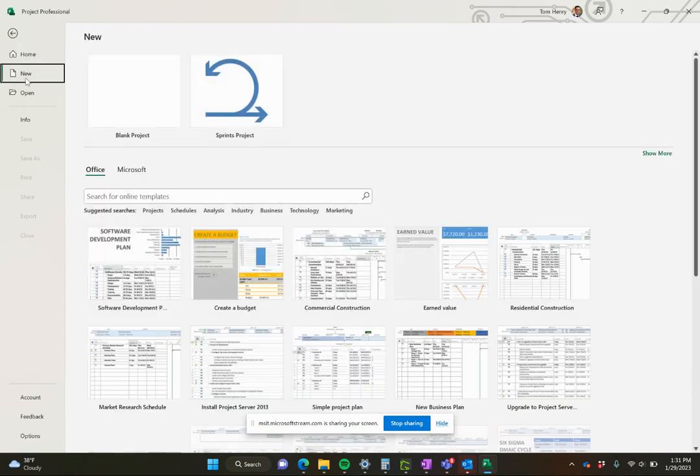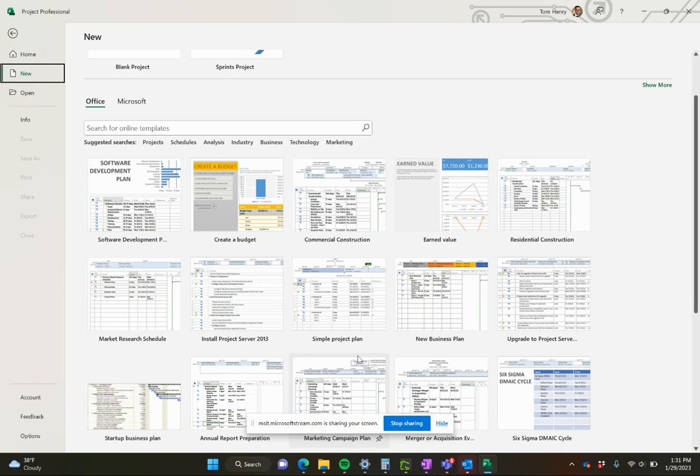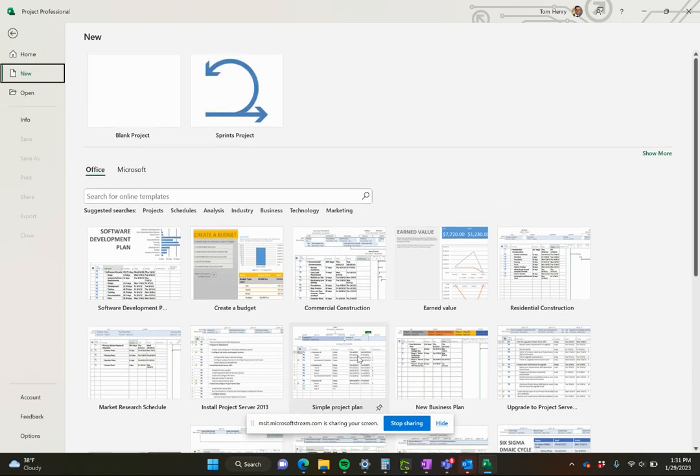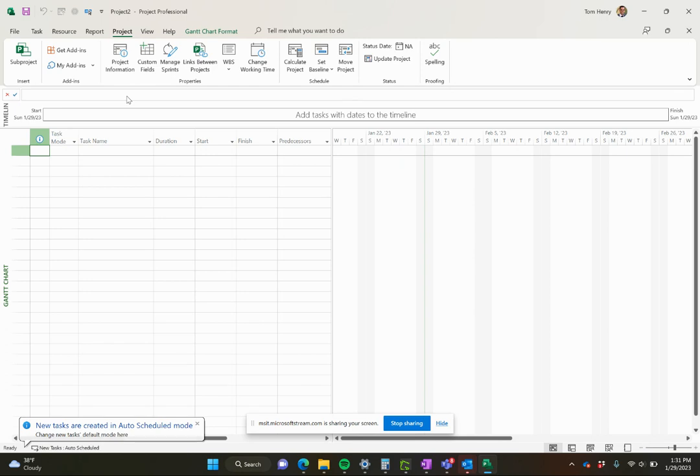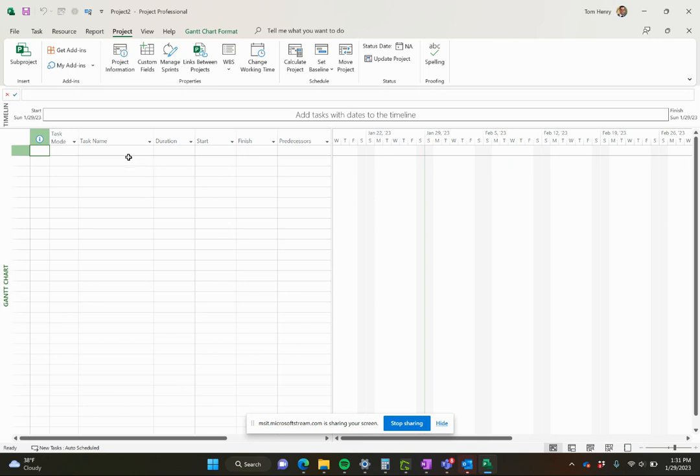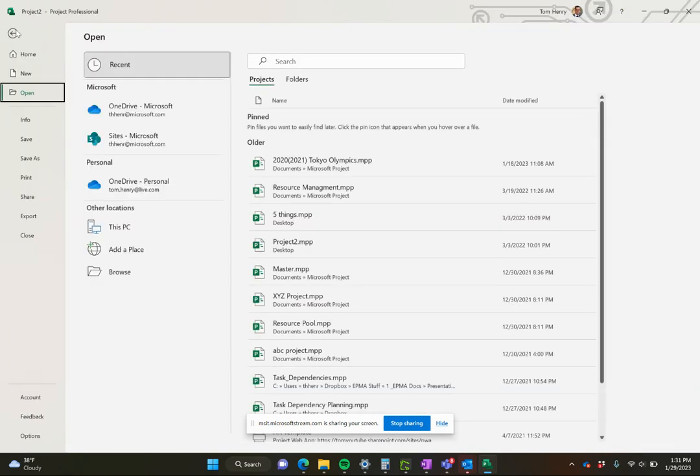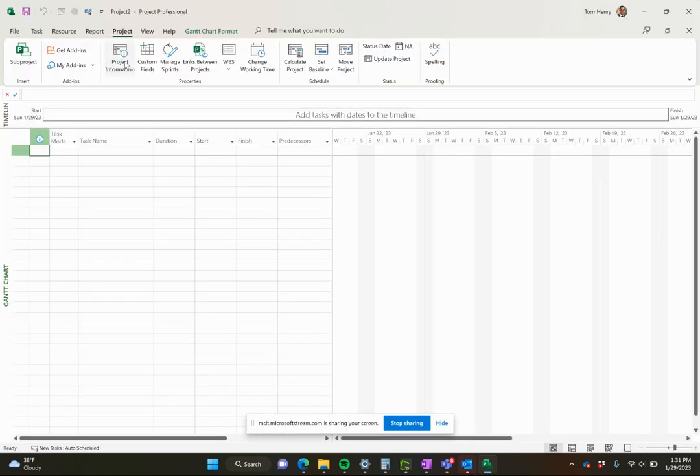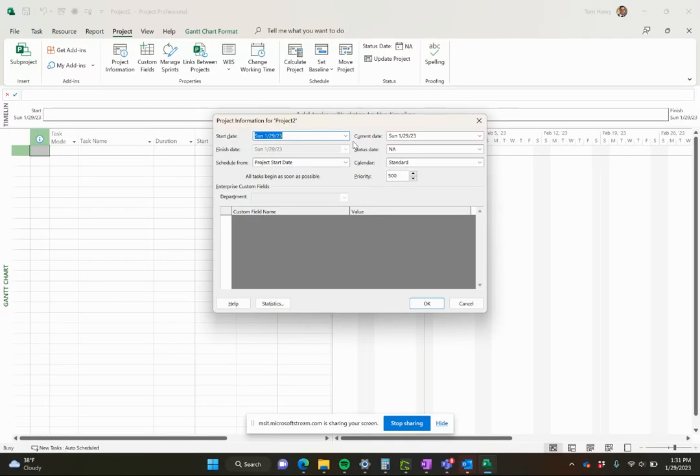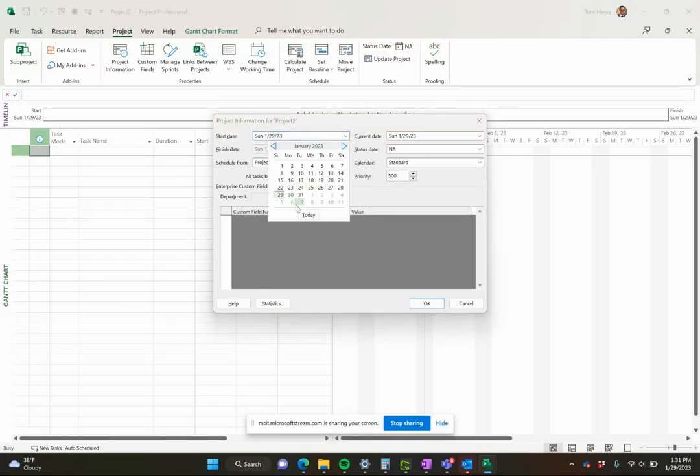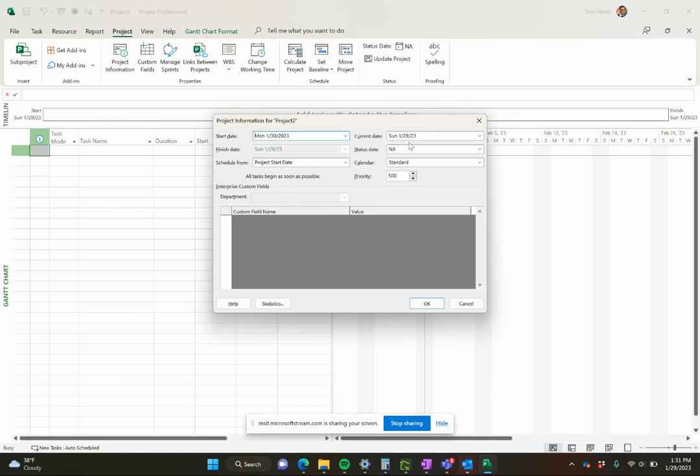Come to file and then new. You can see there's some pre-built templates here, or you can search for online templates. But for the purpose of this training I'm just going to click blank project. In here you can see this is kind of like your Excel spreadsheet where I can put in my tasks, duration of those tasks, start and finish dates, etc. Don't do that. The very first thing you're going to do is come to project and click project information. This is the first thing we're going to do whenever we create a new project to set it up the way we want it to. You can see today's date as the start date. You can change that any day. I'm going to say let's get started tomorrow on the project.